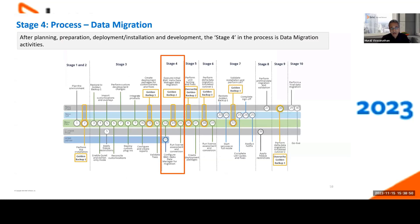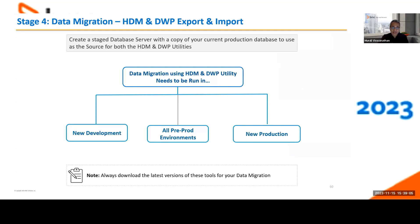Let's look at stage four. Now that you've completed installation, deployment, customizations, integration configuration, and any new development, it's time for data migration. We have two primary utilities: the Helix Data Manager (HTM) and the DWP utility, which covers the Digital Workplace application with export and import options. We strongly encourage you to run data migration in all your environments — development, non-prod like QA/SIT/pre-prod, and production. Always download the latest versions of these tools.